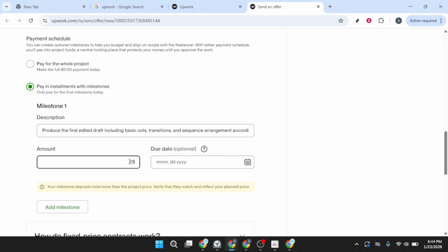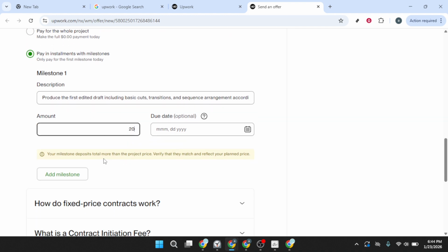If your project has additional phases, you can add more milestones now. Common follow-ups might be revisions, final polish, and delivery of source files. Even when adding multiple milestones, keep each one specific, measurable, and attached to a real deliverable or review point.